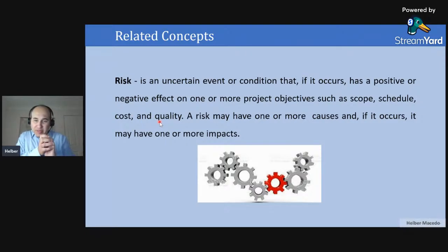So maybe one risk that will affect my schedule, so we increase the duration of my project, will affect my cost as well because I will need to increase the duration of the team that will be there, or because I will have a delay in my project and then it will affect as well my contract with my client.